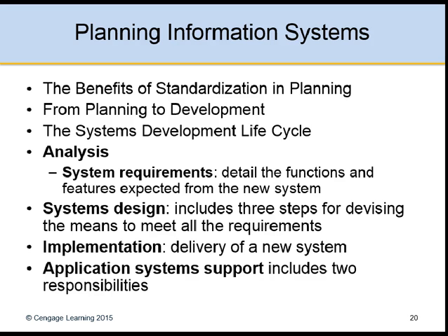Some of the conversion strategies for implementation include parallel conversion. The old system is used simultaneously with the new system, at least for a while. Phased conversion breaks the new system into modules and integrates them one at a time. This reduces risk, but it delays some benefits. And then a cutover conversion, that's also known as a flash cut conversion, immediately replaces all modules. That is risky, but may be the least expensive approach.